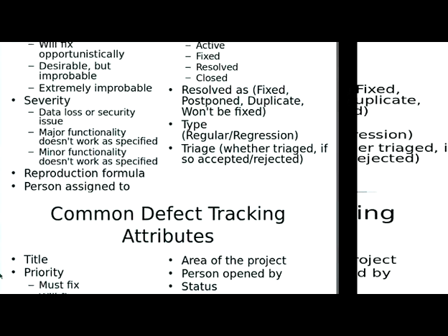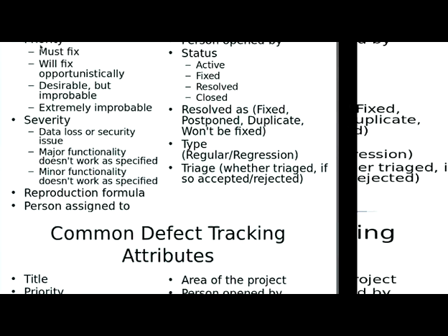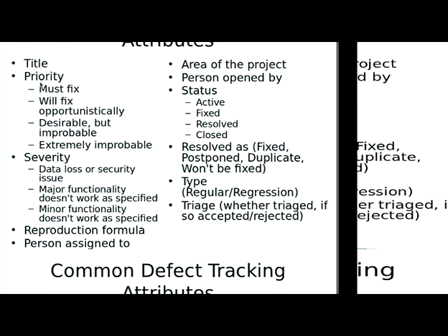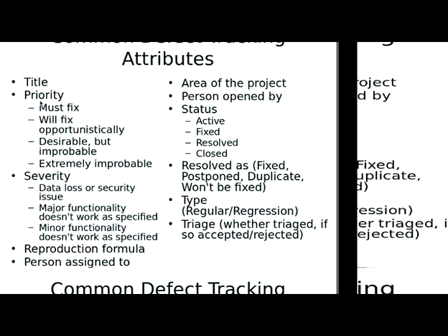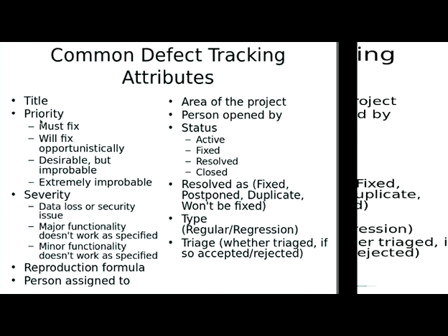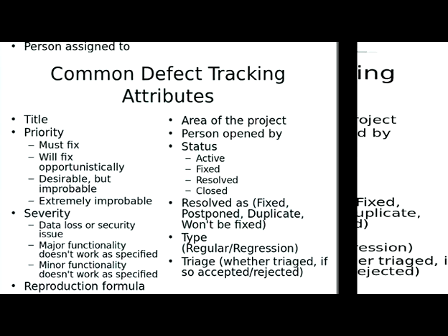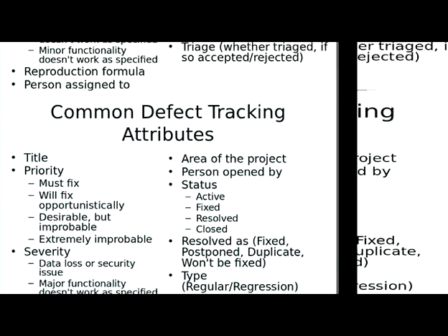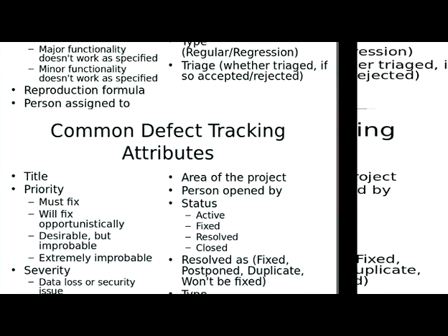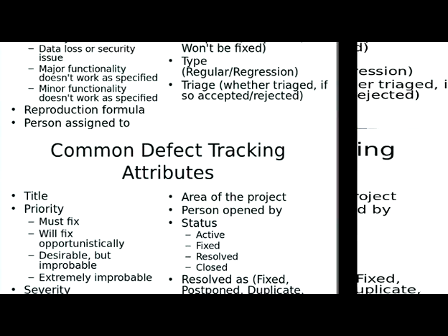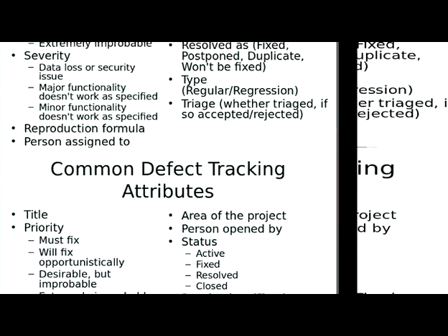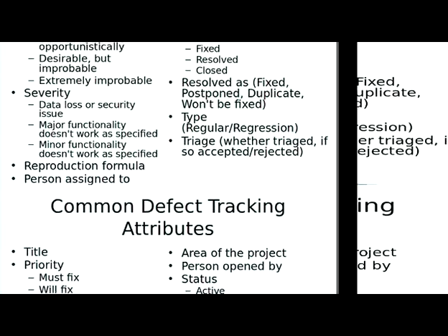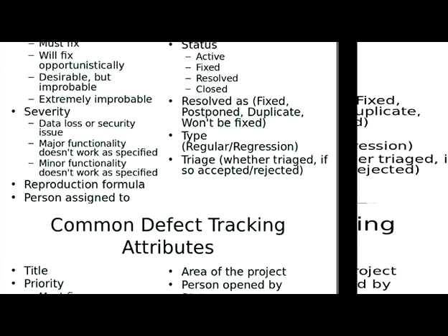Another issue, though, is priority altogether. So severity is conditional on occurring. Priority considers not just the severity, but also the probability of its occurrence. We talked earlier about a similar distinction in what context? In the issue of risk management, of doing effective risk management, where you have to consider the severity of something if it occurs, but also the probability it occurs.